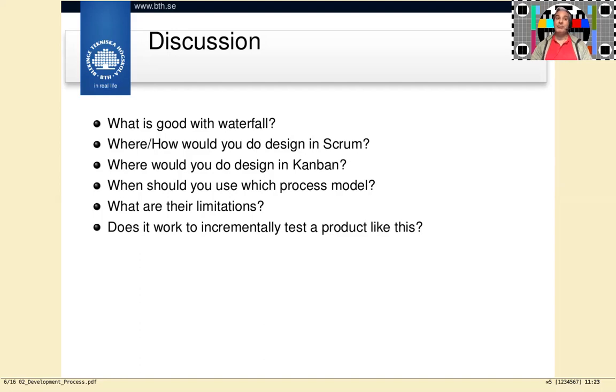In the big 2-year development projects, the classic development projects, testing was always supposed to be done in the end, and in the end you realized that you didn't have time for it because the new development ran over time. So you have to release something without doing proper testing, and then it was forgotten about instead.